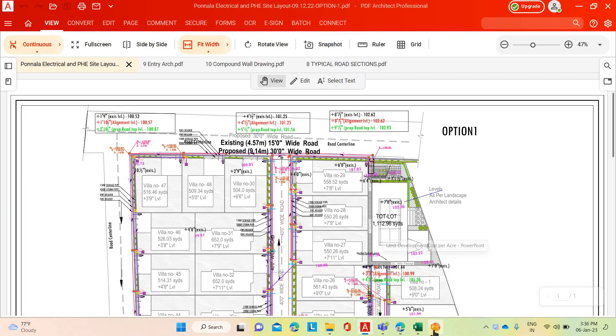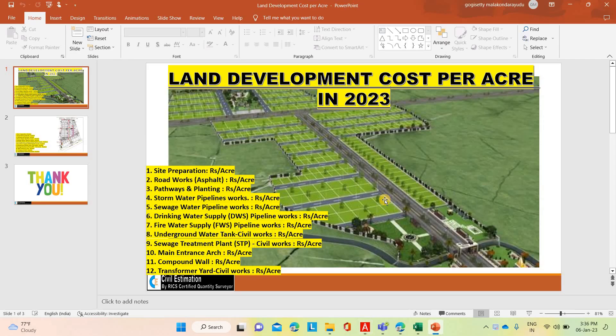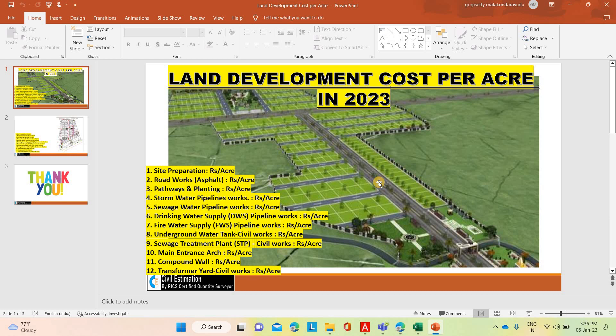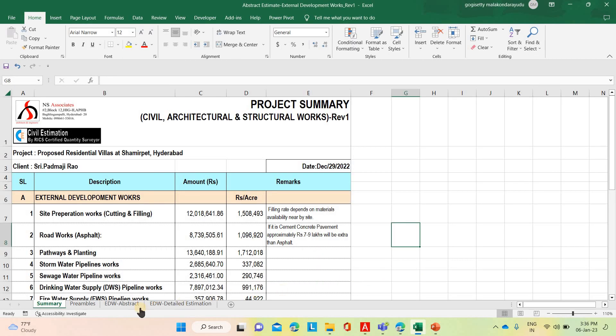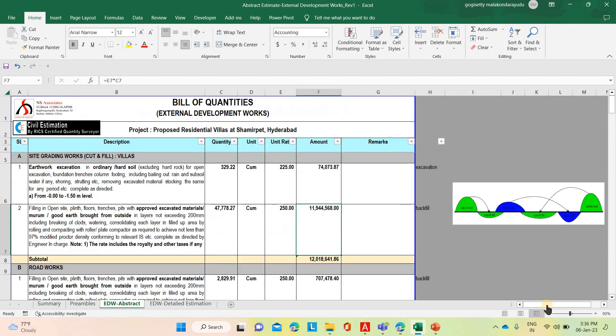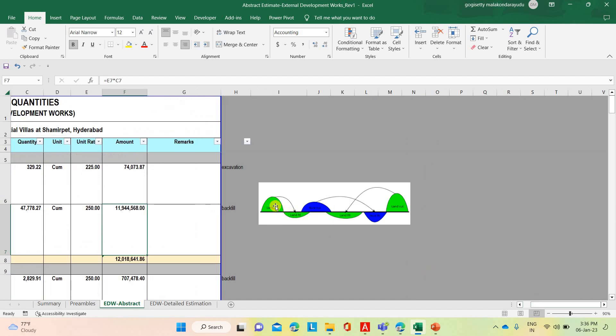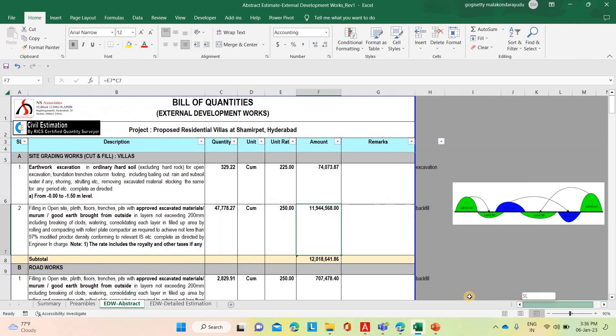First of all, to prepare the land development cost, we want to identify what are the activities involved in the development. Site preparation works means the actual ground profile of the site. Sometimes ground will be plane, sometimes maybe undulations. If it is undulations, we need to do the cut and fill. Wherever the heaps are there, we want to cut it and wherever the valleys are there, we need to fill the cut portion in the fill area. That is called the site preparation works.